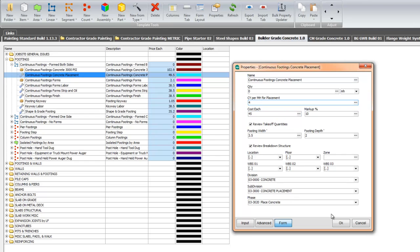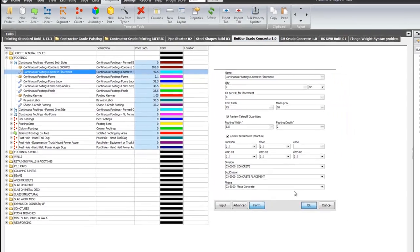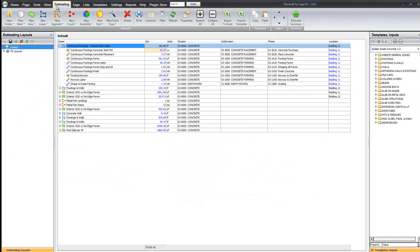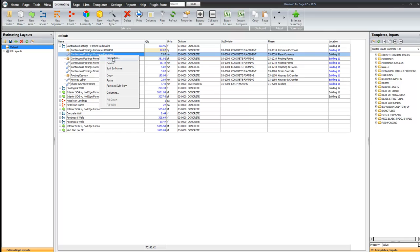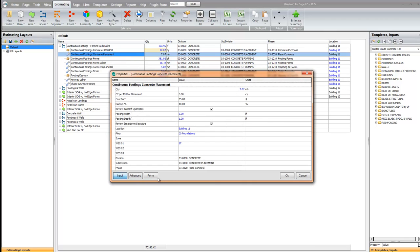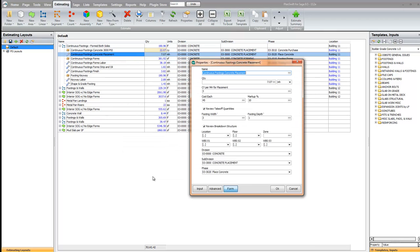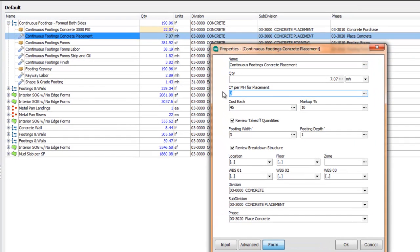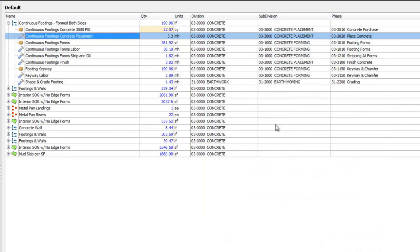Now once again, if I go back to the estimate and takeoff under estimating, and I look here under placement, and I see the properties, and I would like to go to the form, here's where you can modify that on a job by job basis. Notice there's 7.07 man hours right now. When I click OK, that value has changed.